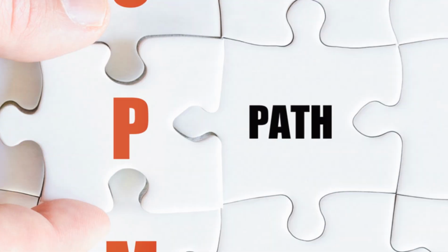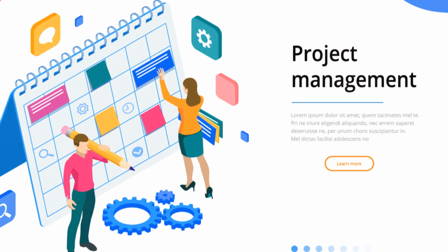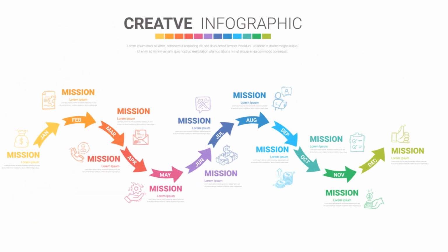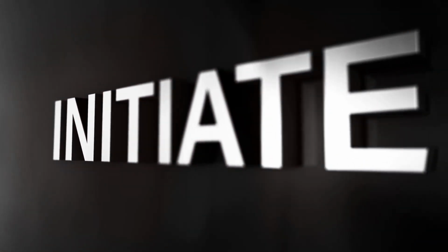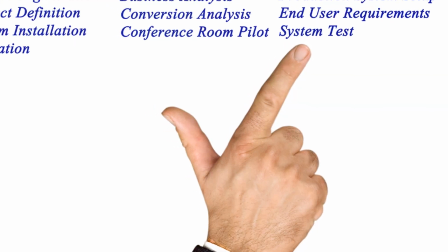The Critical Path Method, CPM, estimates project duration and identifies critical activities. CPM helps prioritize tasks, allocate resources, and mitigate delays. The critical path is the longest sequence of activities, determining the shortest project duration. Delays in critical path activities impact the overall project completion time.